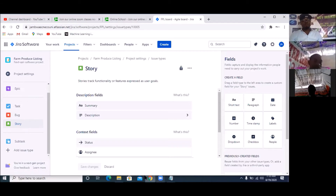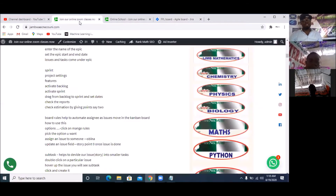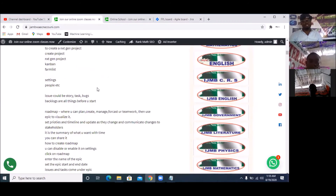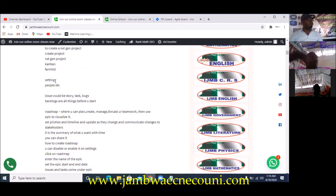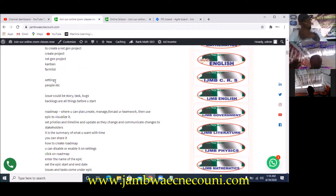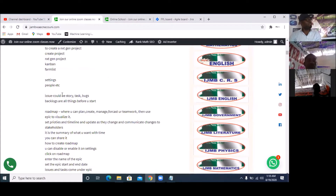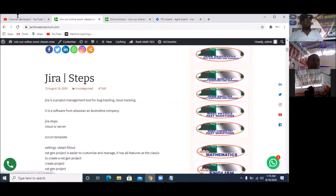From our website, what is the next thing we are supposed to do? After creating the issue types — which could be Story, Task, and Bug — the next thing is to go to the backlogs and put everything. But before this, I should have gone to settings and activated backlog and other things. Because I'm not following these steps strictly, that's why — so for you to do the right thing, you must follow these cheat steps on jambwaecnecouni.com. Search for JIRA steps.